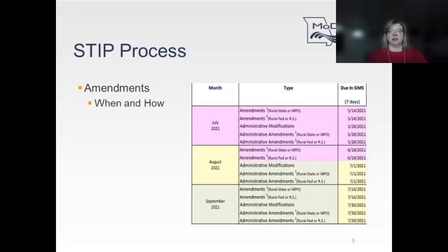Major changes can begin in September with the amendments. These changes include adding or deleting projects and budgetary project changes that exceed $1 million and 25% of the construction estimate and right-of-way program for the project. Amendments can be submitted for added or deleted federally funded multimodal projects as well. These levels of amendments require commission and WNDOT approval.